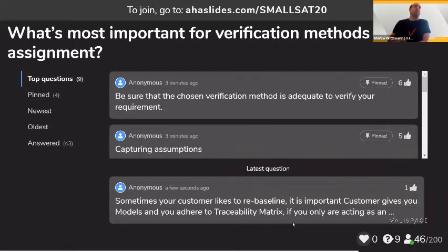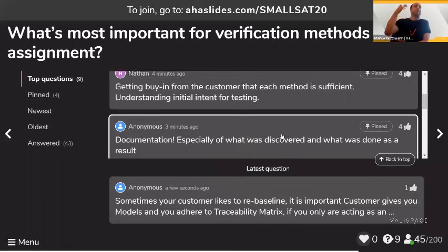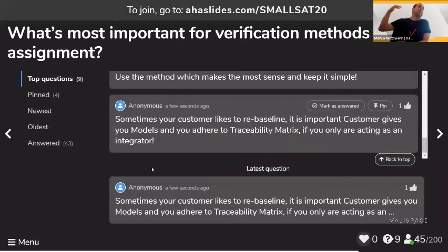In the beginning, just say, okay, it's going to be tested. Then you say, okay, it's going to be tested where, right? On which equipment? And then you say, oh, it's going to be tested and analyzed and so on. And what's the name of these analyses? Who does that? So only if you know what the bar is, and coming back to what we had before, right? Looking at budget, you cannot do infinite things. So you have to plan for what you are going to do to have a realistic account.